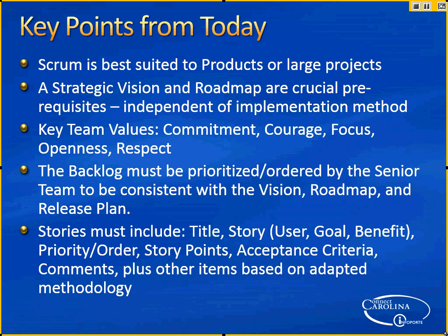It can be broken up because when we've done it in the past, it doesn't work well to try to do communications and testing in the same sprint, depending on how long the sprint is, because if development slips, you still have to make the change management work in the last 3 days. It's easier just to schedule it in separate sprints, because you end up with deliverable code that is not tested or documented, but in the next sprint, your deliverable is done. Yeah, I can see where that would happen. You get to the end, and the final thing comes out, and it hasn't been tested. 2 weeks are up.